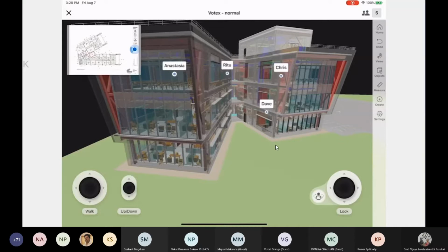Most of our projects with our US drywall partner implement this: the field inspector or field manager carries this tablet, has an overlap of the virtual model on what is being constructed on site, and takes a snapshot and sends us where there are discrepancies or anything we have to focus on.